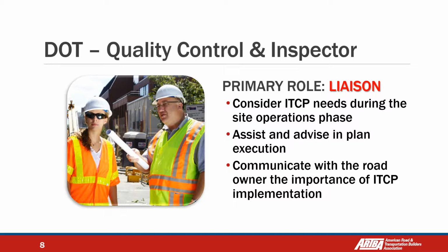People can say, well, it's an expense. No, no, no, it's not an expense. It's an investment. We are investing in preventing accidents because just investing $10,000 to $20,000 to prevent an incident can save us maybe $300,000 in paying for the cost of an incident. So we have to think about the internal traffic control plan as an investment.